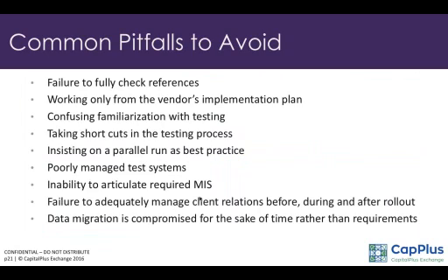You need to define the MIS systems. You need to start looking at it from a very high level to ensure that MIS systems are defined, because you can't define MIS systems right at the end of the project. You have to start doing it at the beginning of the project, purely because sometimes the information that is required for MIS has to be picked up at the initiation level of the data. Take, for instance, the loan application, you need to pick up some of the information. So you have to ensure that you define the MIS at the beginning itself.